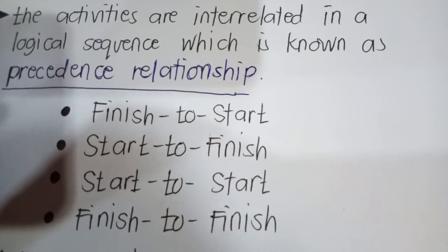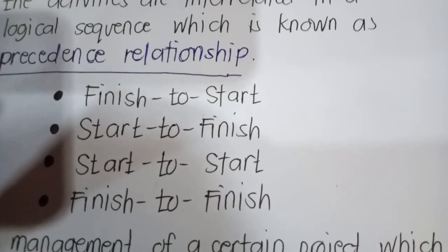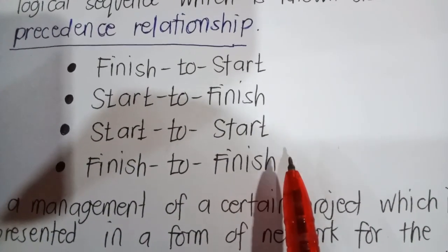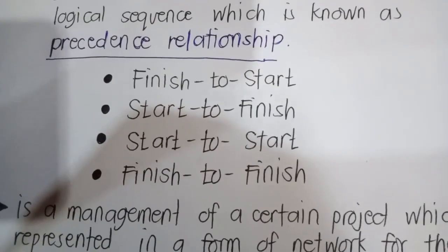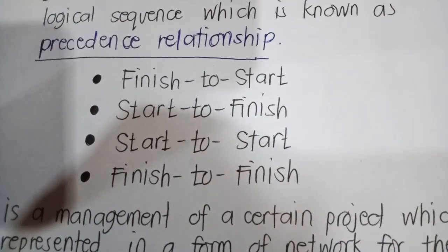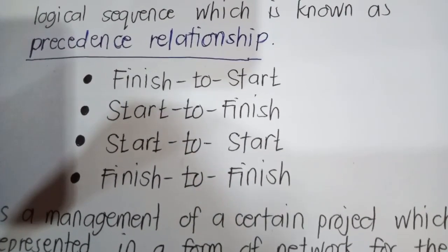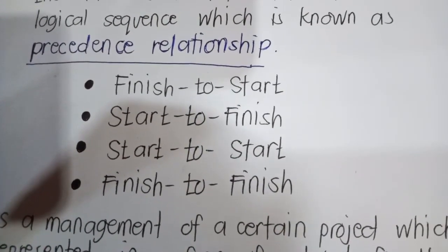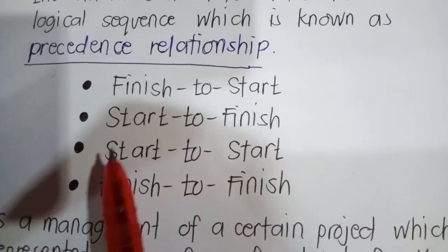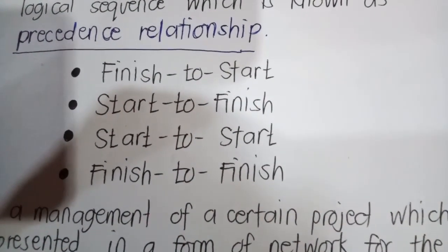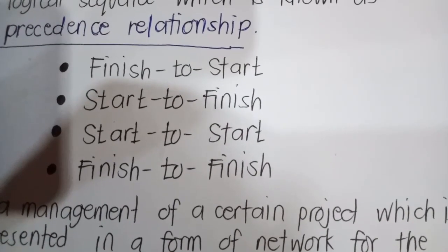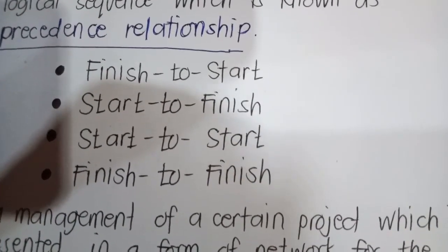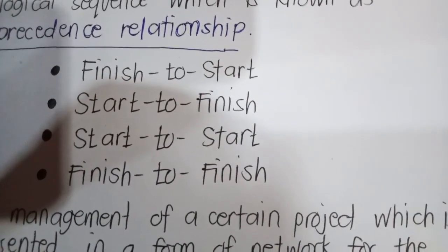And finally, the last method is finish-to-finish, which means that activity A must finish first before activity B can finish. For example, assume you are cooking dinner and you want the turkey to finish cooking before the potatoes. Activity A is 'cook the turkey' and activity B is 'cook potatoes.' The finish-to-finish relationship says that the turkey must finish cooking (activity A) before the potatoes finish cooking (activity B). This relationship is based on end times — they can each start whenever they need to, as long as they finish in this order.